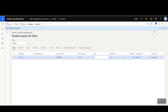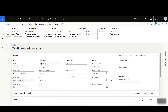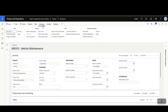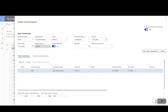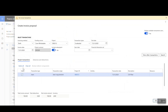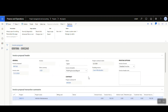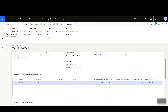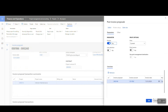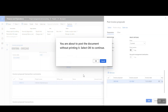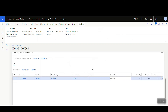Close out of the item requirement, go under the Manage tab, and select New Invoice Proposal. Make sure to select your transactions before hitting OK. That creates the invoice proposal. From there, click Post and confirm OK — and that creates our invoice.